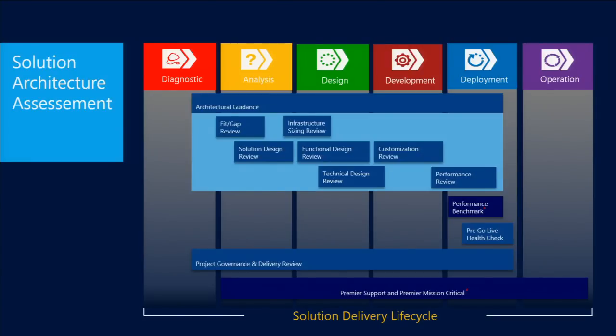And what you're doing is in that code analysis tool, you're uploading your model file. It's spitting out a set of issues that's raised, and you should be building in those remediations. Treat those as bugs, build them into the process, make that one of your best practices. And it's amazing if you go through that process across all of your developers, they'll actually improve their development skills in there, but it's a good secondary check.